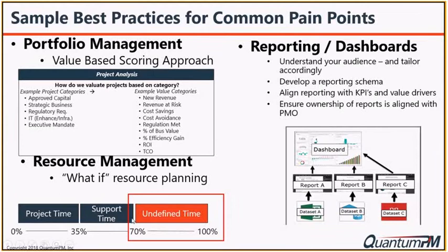And if there's this undefined part, what you do is set up a program that says, okay, we're going to define this 30% as, quote, unrealized or unrecognized time, and then reduce it down and say within 6 months we'll get it down from 30% to 20% to 10%. So it becomes sequential in that way.